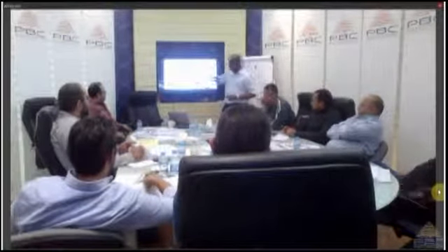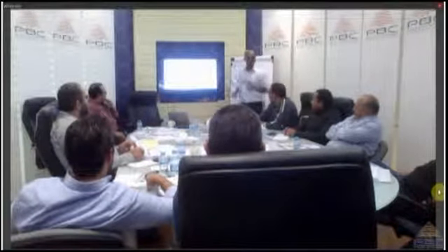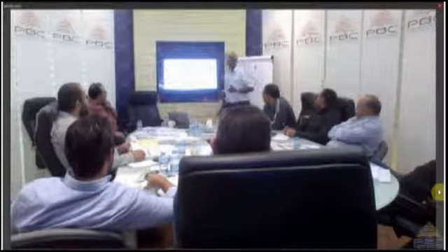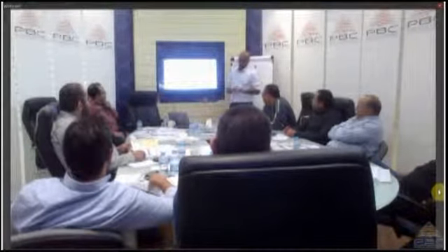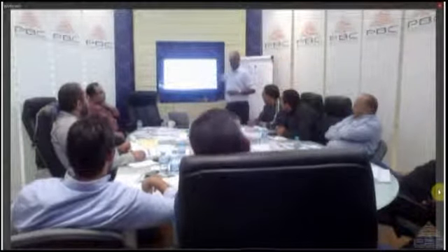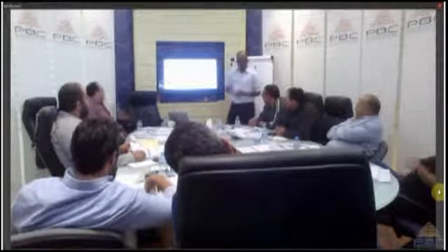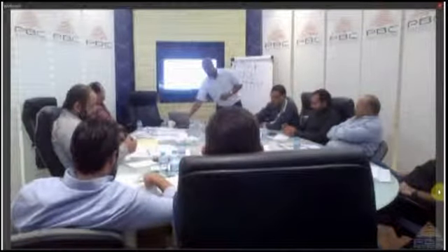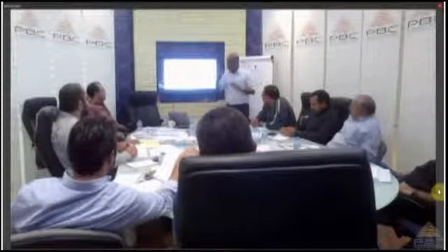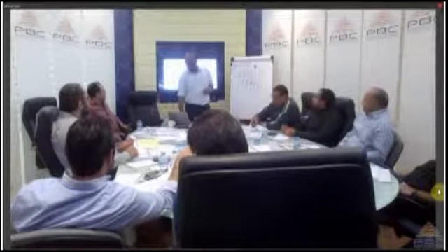So what is the budget here? What is the budget of this project? So first of all, what is the cost? The cost is 28. What is the budget? So the budget is 8 in week 1, 1 in week 2. Okay, so the amount per week, which totals up to the budget. And then if we lay out, or if we draw this out, it will come out something like this. Not a perfect S, but the overall orientation of the S. Okay, and this is your S curve graph.